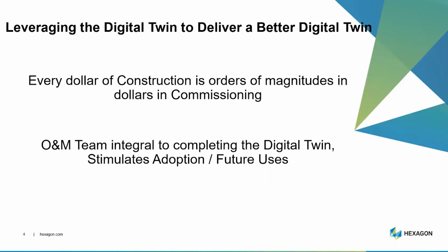Just a digital twin based on construction and commissioning versus what was necessary to hand over to operations in another 2 years. They need much, much more data in commissioning than they need in operations. If a typical plant may have 100 or 200,000 tags in operations, they may only care about a fraction of those. But in order to commission the plant, they needed to track it all.